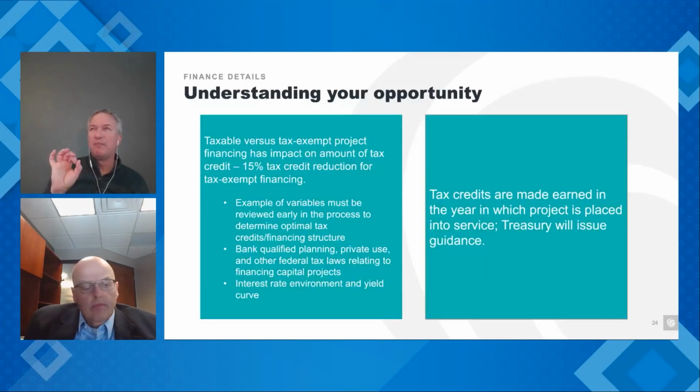Talking a little bit about, there may be a question that's arisen on when do I get these credits? The credit is earned in the year you place the project in service. So there's a nuance there relative to financing, where you think of it as a construction loan on steroids a little bit, where you're going to have your traditional construction loan. And then after the year that project is placed in service, which essentially means generating electricity or doing its intended purpose, April 15th comes, sometime between the end of the prior year and April 15th, you file your taxes in theory, and you may not have any income, as a direct pay eligible entity, but you still will be filing some form of a tax return.